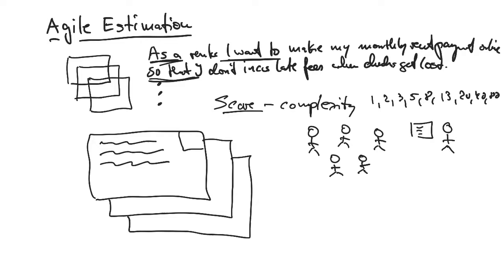And you ask everybody to go and think about this. And we use Delphi to do this. Or to be more precise, a modified version of Delphi. It's actually often called planning poker. In fact, what you do to speed this up, you give everybody pre-printed cards. You can actually buy them. There's actually software you can get, or apps you can get for your phones that are Scrum cards. And you ask everybody, hey, go think about this. How hard do you think this is to do?